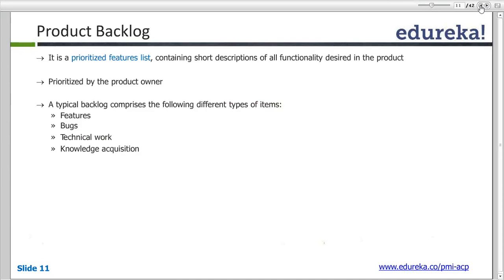Coming back to the product backlog definition — we discussed that the product owner owns it and prioritizes it, but all the detailing and acceptance criteria are written by the team in discussion with the product owner. Once the product owner prioritizes, the team picks up those prioritized features and decides how they will work on them. Product owner defines the priority, but it doesn't command the team — it's the team who picks up the features. This goes back to the Agile manifesto principle of empowered teams.